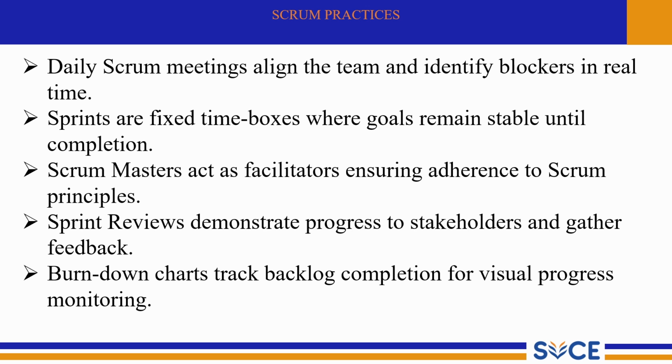And next point, sprints are fixed time boxes where goals remain stable until completion. A sprint usually lasts 2 to 4 weeks. Once it begins, the scope should not change, so the team can focus completely on delivering the agreed goals.